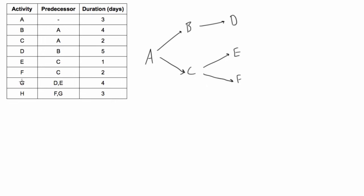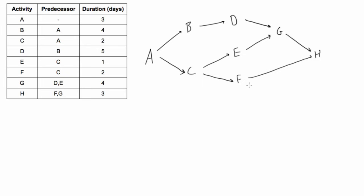Next up we have activity G — this depends on D and E, so we need arrows coming from both of these leading into activity G. Lastly, activity H depends on activities F and G, so F and G both lead into H. This looks right — we have no unnecessary crossovers so we don't have to redo it or shift anything around.